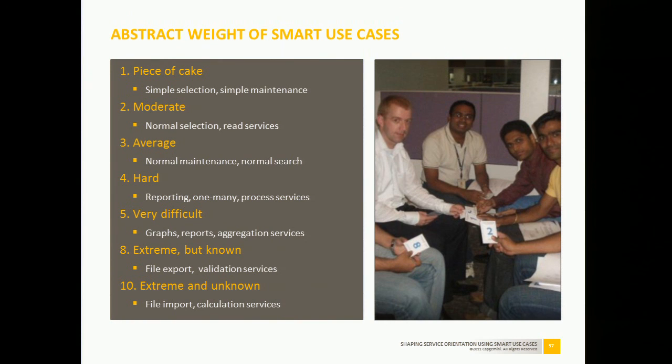And that means if we use the range for these smart use cases over the past 10 years, no matter what technology you're using, it's a requirements technique. Which means that independent of the technology you're using, you can estimate the actual complexity. The velocity that you get in a project will be different. For instance, the SOA project at a large transportation company did 35.2 points per iteration. We're doing 24.2. We do 7.9 hours per point. They do 15.2. So there's a difference because the technology differs. But that's a difference in speed, not in complexity.